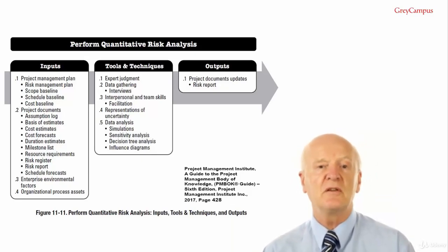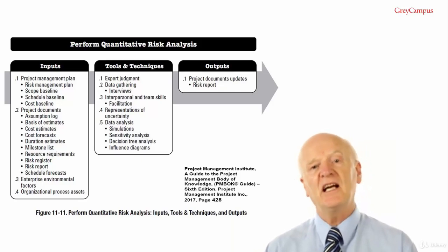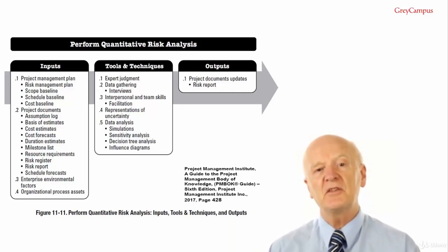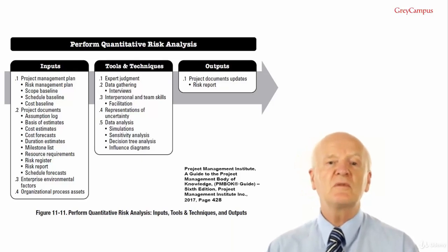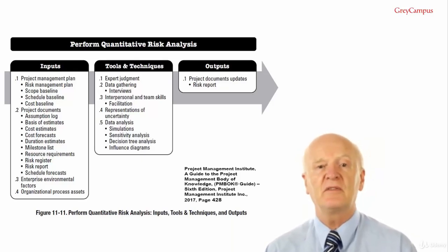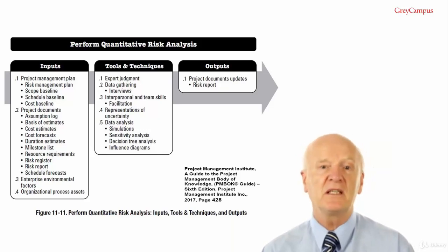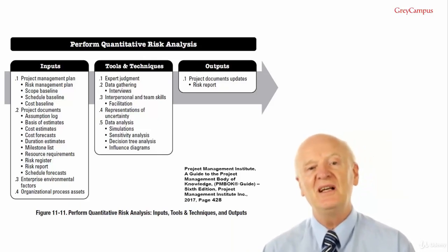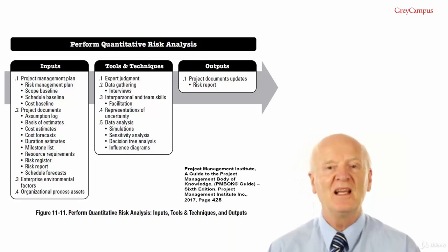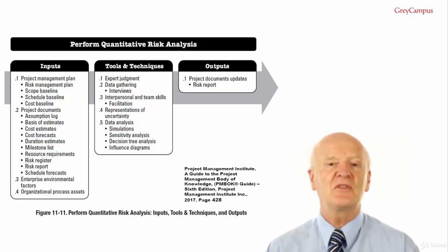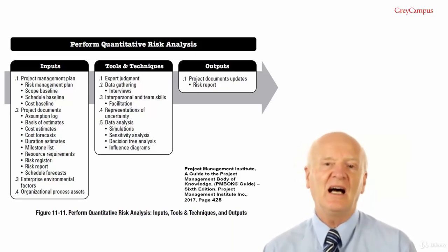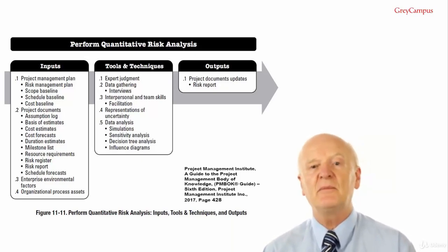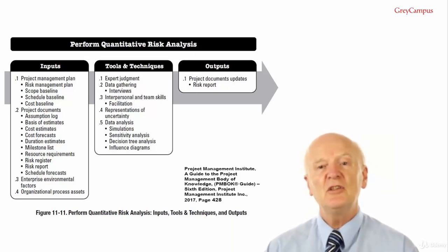Techniques you can use would include simulation. In the exam, if it asks about the simulation method, the most likely answer is Monte Carlo method. Or if it asks a question about Monte Carlo method, then the likely answer is simulation. What is Monte Carlo, the country famous for a casino, got to do with project management? Monte Carlo is computer software which uses high numbers of repeated random samples or pseudo-random samples to obtain numerical results.